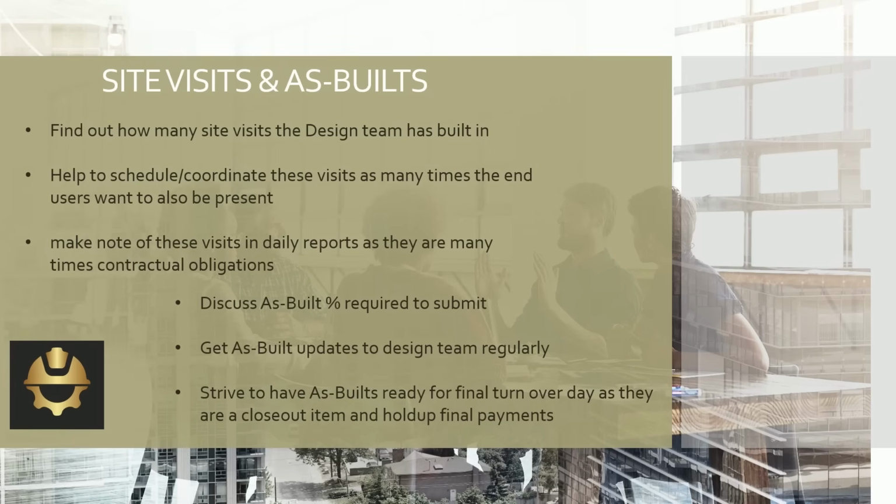It's important as a QC manager that you get that down up front because the QC manager will be scheduling that. Your design firm, outside of seeing submittals and RFIs come through, has no pulse on what usually is happening on a project. Unless you're sending site pictures and videos over to them, they won't know where you're at or what percentage the project's complete. So it's going to be up to you as a QC manager to say, hey, design team, we're almost at this benchmark. You said you wanted a site visit here, so we need to get it scheduled in the next few weeks.